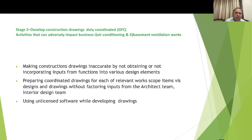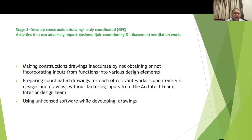Stage 5 is developing the construction drawings, which are duly coordinated GFC (Good for Construction) drawings. Activities that can adversely impact the business include making inaccurate construction drawings by not incorporating inputs from relevant functions such as customer, project, or other functions. Coordinated drawings must factor inputs from the architect team and interior design team. Using unlicensed software is also a risk at this stage.